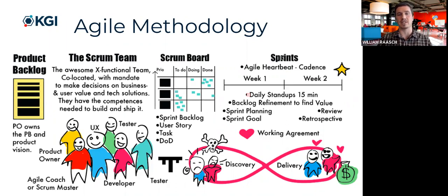Here, because these are sprints, which typically last only 1 to 2 weeks, everyone has a vested interest in making sure it rolls out properly and to the satisfaction of the customer. By the way, here's a sprint. It's about 2 weeks. They have daily stand-ups, so they're meeting every day, trying to find value within the backlog that the product owner gave them, and then figure out how to plan out rolling out the features that can answer whatever value the customer wants.